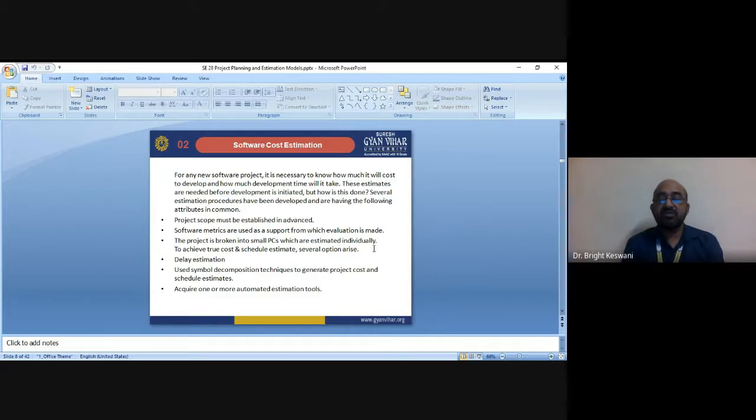There is some relationship between the project duration and the total effort in person-months required for completing the project. If the staff needs to communicate for the completion of a task, then communication time should be counted. By increasing staff for a project, we may actually increase the time spent in communication. So reduce the staff, don't do unnecessary staffing for your project, and we cannot treat the schedule as a variable. We should treat the schedule as a constant. Then only we will succeed in our software project.